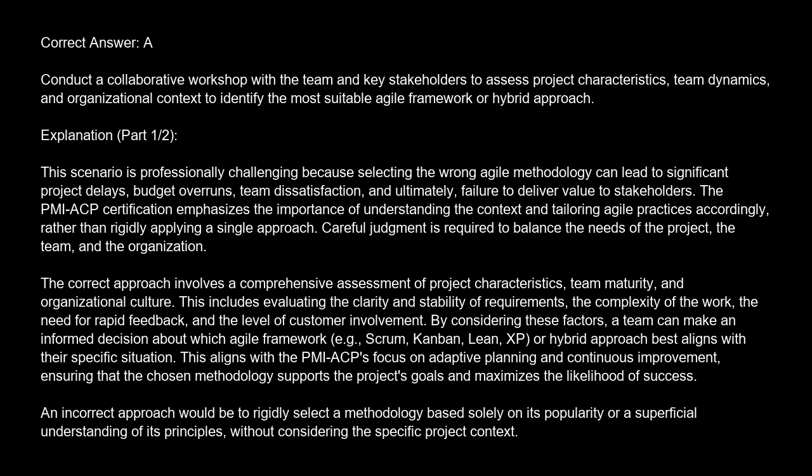The correct approach involves a comprehensive assessment of project characteristics, team maturity, and organizational culture. This includes evaluating the clarity and stability of requirements, the complexity of the work, the need for rapid feedback, and the level of customer involvement. By considering these factors, a team can make an informed decision about which Agile framework, e.g., Scrum, Kanban, Lean, XP, or hybrid approach best aligns with their specific situation. This aligns with the PMI ACP's focus on adaptive planning and continuous improvement, ensuring that the chosen methodology supports the project's goals and maximizes the likelihood of success.